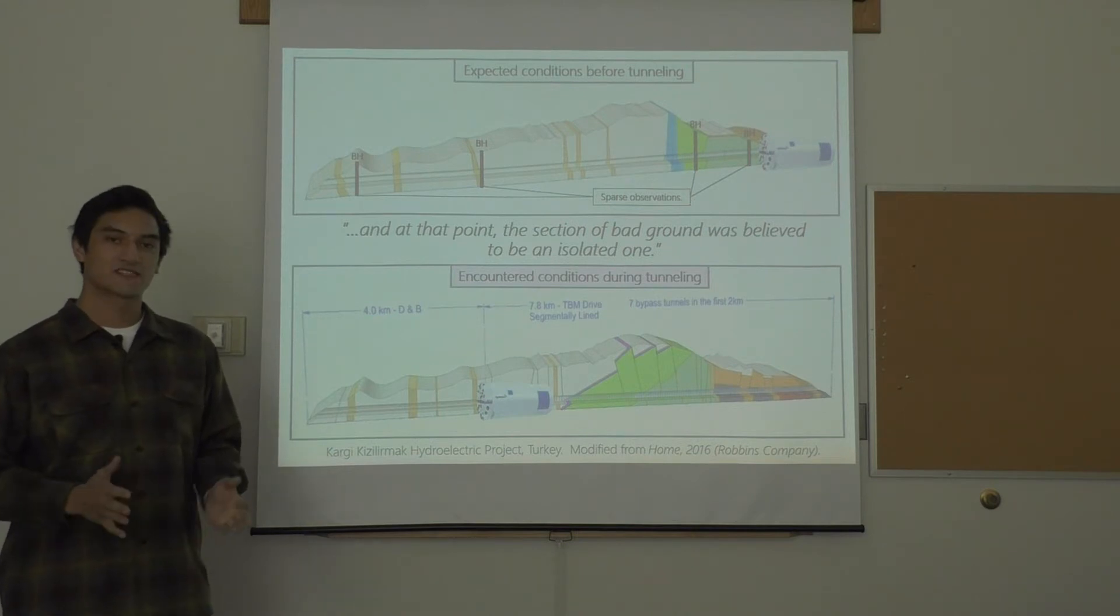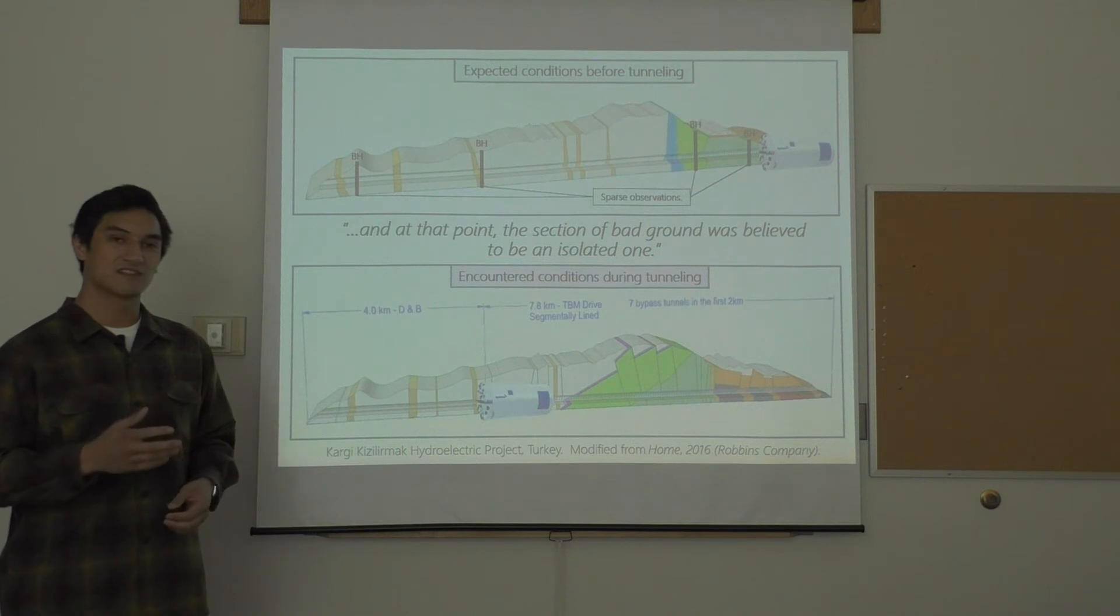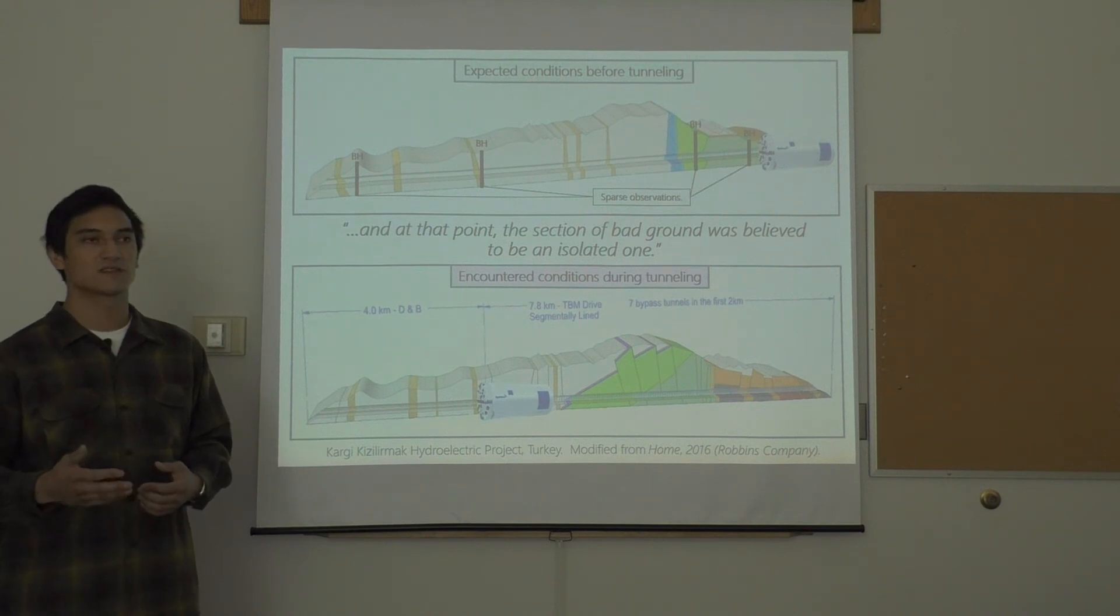Upon encountering the first set of unexpected ground conditions, the site engineers made the assumption that the problematic ground was isolated and that tunneling could continue as planned. Had the additional information from encountering the first occurrence of unexpected ground conditions been utilized to update our geologic understanding for the rest of the tunnel alignment, it is possible that the subsequent occurrences could have been predicted and their effects mitigated.